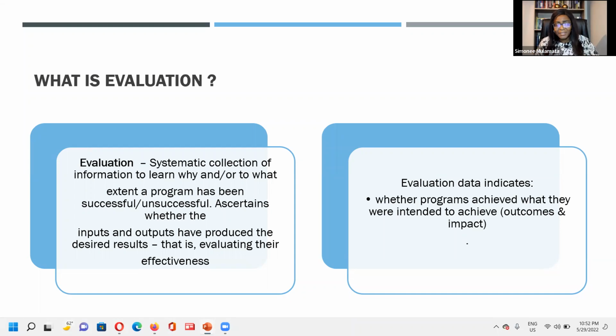But we discovered that we could not get any form of outcome, positive outcome. There was nothing. The project in itself, just to mention an example, was about the prevention of teenage pregnancies and child marriages. And after the lockdown, when we came back, that was the beginning, we discovered that the numbers of teenage pregnancies were three times as high as before the project. Now remember, before I came, there was a six months gap. There was nobody on the project. So these are the kind of things that evaluations are looking at, and it's looking at its effectiveness.